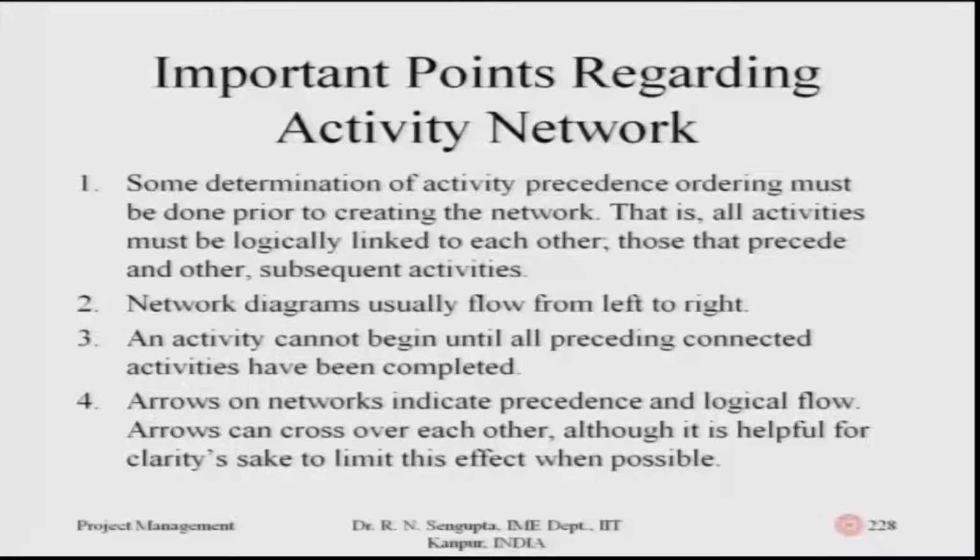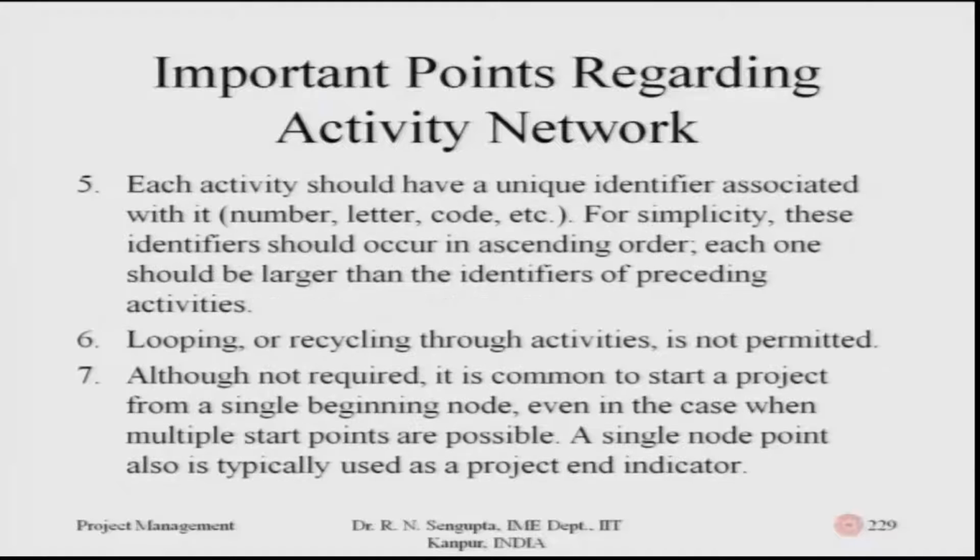An activity cannot begin until all preceding connected activities have been completed, which is very important to know. Arrows on the network indicate precedence and logical flows. Arrows can cross each other, although it is helpful for clarity's sake to limit this effect when possible, because crisscrossing would make it much more confusing.